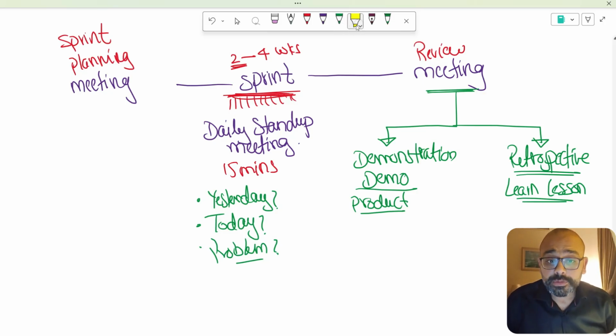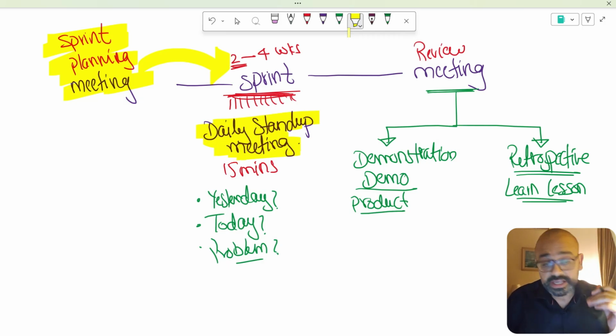Now, how many meetings I have gone through over here? There is a sprint planning meeting in which you plan what are the things you are going to do in the sprint. Then there is a daily stand-up meeting where you have a quick progress update meeting, that what have you done yesterday, what are you going to do today, and is there any problem, just for 15 minutes.